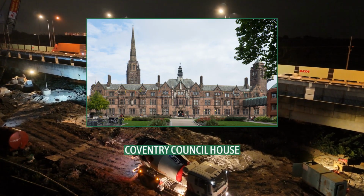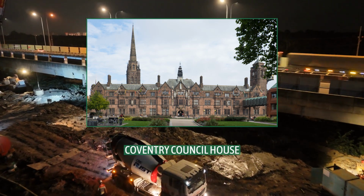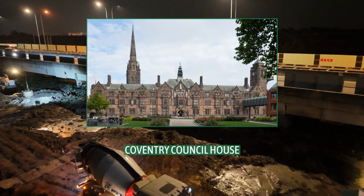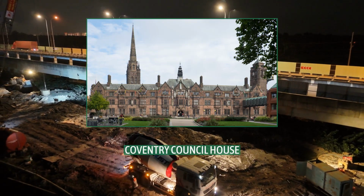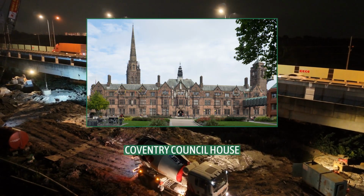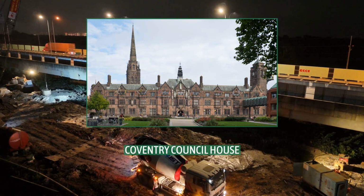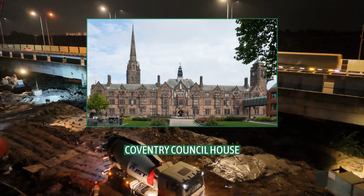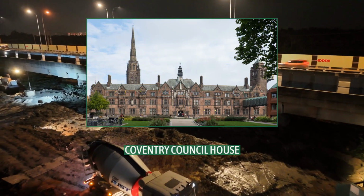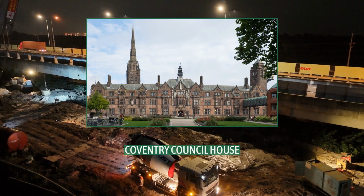Some features of the demolished areas were retained in the new road, for example stone sets from St John's Street, which were relayed as the divide between the cycle tracks and pavements. On 1 July 1959, with the demolition work almost complete, construction on the Coventry Ring Road began. Piley General Cable Works contractors laid 9 long tons, 91.0 kilograms of power cable underneath the roadways, after which the route was levelled in preparation for the laying of foundations, which began in mid-August.